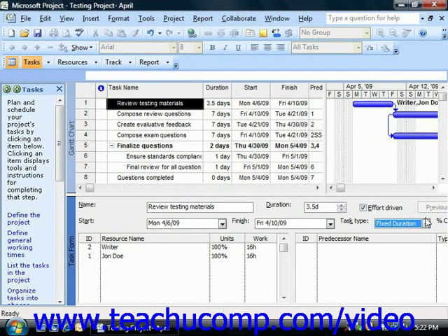Also note that it is possible to keep the work value for the task fixed if desired when creating resource assignments by simply choosing the Fixed Work choice within the task form view. And once again, this can often result in a durational decrease as well.